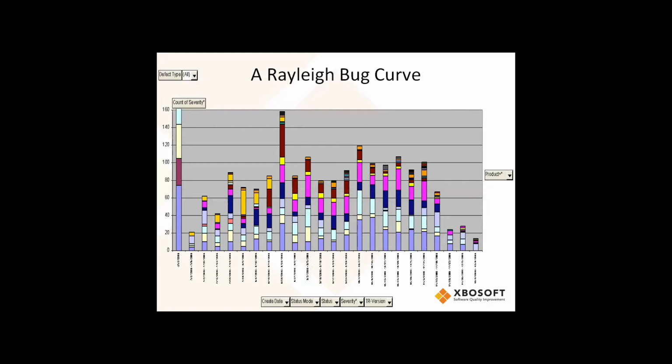Some of you might say, when we're talking about something that's more complex and difficult to do, we might find more bugs in the code that have to be tested before a system is ready, and that would be correct. Something of lower complexity might have a shorter Rayleigh curve with a lower peak.